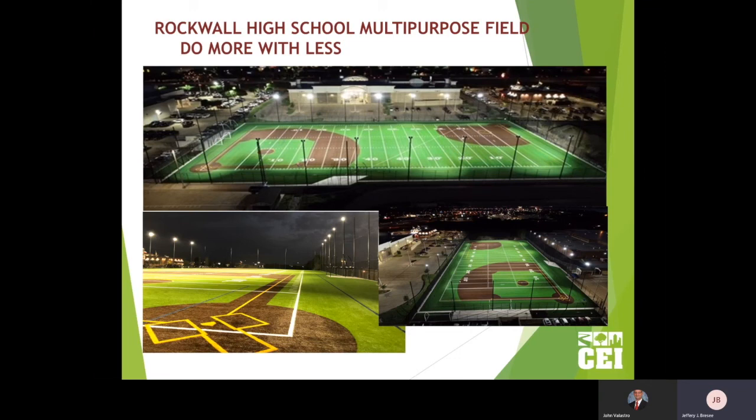We were able to come in and say, well, let's look at what we do have. There's one little field left. We use it for a lot of stuff. We really can't lose it to this, but could it all be used for the same purpose using synthetic turf? Well, the durability of turf made it possible, but they were boxed in by businesses, car dealerships, you name it. They needed netting up all the way around it, so it starts to drive the price back up to make it work. And by the time we said we also got to do this at night, well, those lights were going to get us back to where we were, just pushing the budget, or at least uncomfortable.